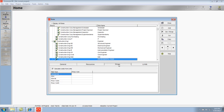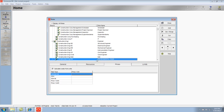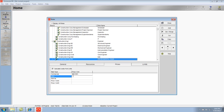When I go to the Prices tab, I can identify the price per unit for that role when he's working on a particular rate type. So for example, if I'm working on a project with a commercial rate type and I am assigning the role of Environmental Engineer, that role will be assigned at a rate of $60 per hour. Whereas if the role is assigned to a project using GSA rates, it may be $50 an hour.